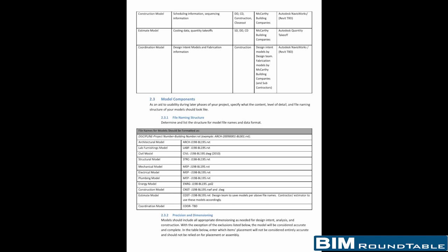And is that a separate line item on the fee? Yeah, separate. And in fact, that was something that wasn't thought of in the original, and then when we talked about it, kicking this off, we agreed to an add service for them to do that. Okay. That's good to know.